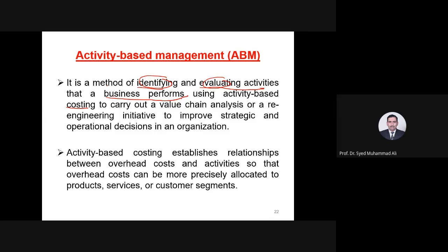Activity means moving from the base office to the site, and going back to the base office again in the evening after traveling 50 kilometers, using a jeep or a car or a motorcycle or on foot, and so on. So we are doing the costing also. Now when we divide the entire process into small activities or tasks, and we know the cost of each task, we can do the analysis.